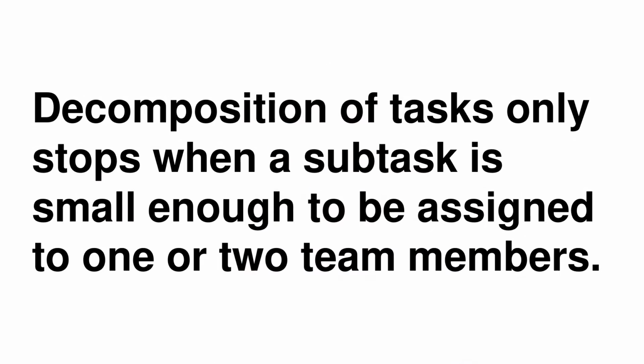By decomposing tasks into smaller subtasks, a team can better understand what work must be completed in order for the major task or deliverable to be finished. This process of decomposing tasks can occur many times and only stops when a subtask can easily be assigned to one or two people to work on. Recall the decomposition method, where you break down a product or process into chunks or aspects. The process of making a work breakdown structure is very similar.